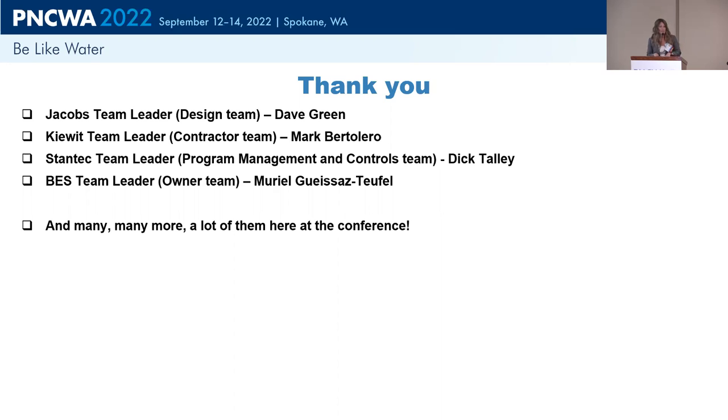I do feel like we got more at 60%. Yeah, 60%, the deliverable was really where we had the most VE. I see a lot of nodding. Yeah, I got it right. 60% is where we get the most VE items. We still got a fair amount at 90%, which was a little scary, but this is where everybody stayed calm and said, let's just go through it and see what happens. We did red light a lot of items there because it was, we're not going there, but we still have some decent proposals.